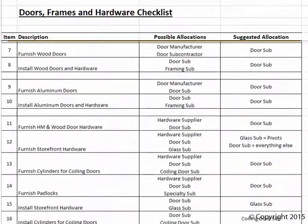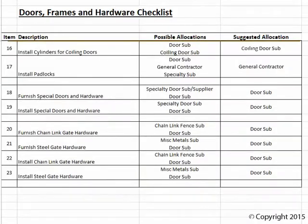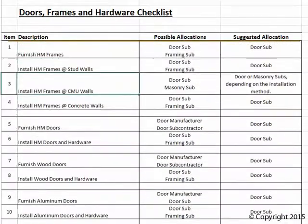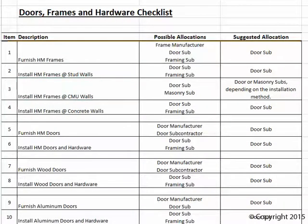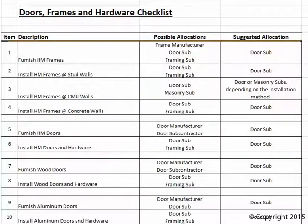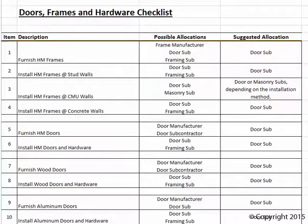I've developed a spreadsheet illustrating which bidders may include the various items associated with the doors, frames, and hardware scope. A 'Possible Allocations' column shows the complexity, and a 'Suggested Allocations' column lists the party I recommend for each item. On a hard bid public works project you'll need to deal with all those puzzle pieces to get the most competitive bid, but on a private project with more control, these suggested allocations are more achievable.